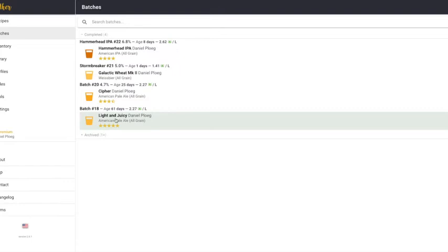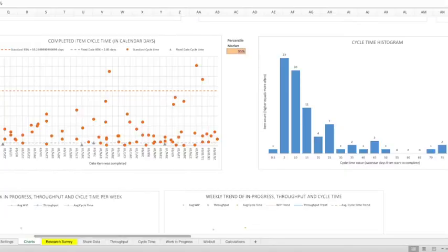So that's where I need to make sure that I go upstream and make sure that I don't run out of beer to serve. For a service delivery review for knowledge work, you'll take into account a number of other data points such as these lead time charts, or you might look at cumulative flow diagrams, defects or blockers, and the data related to that. There are a number of other types of data points that you can bring into these reviews, so that you can make your service really fit for purpose.